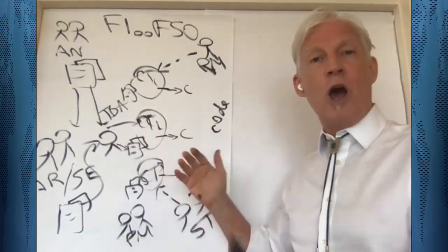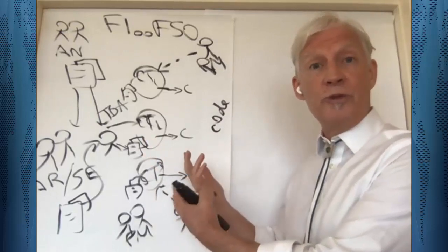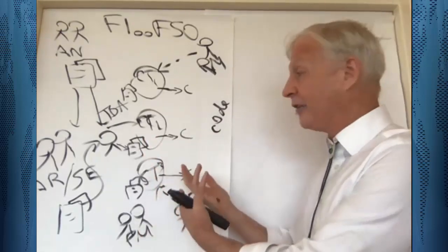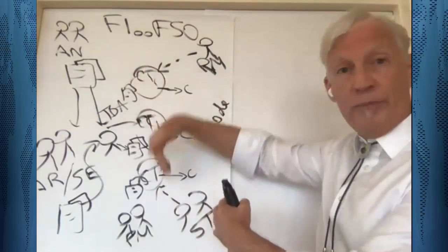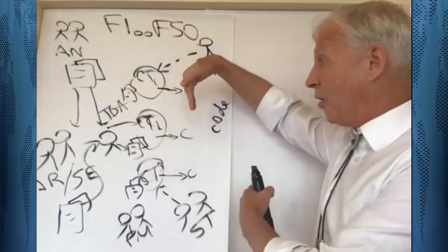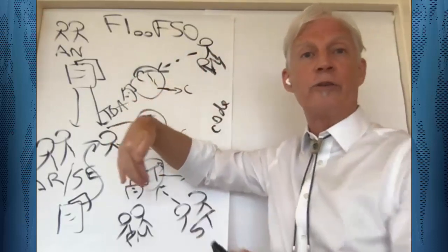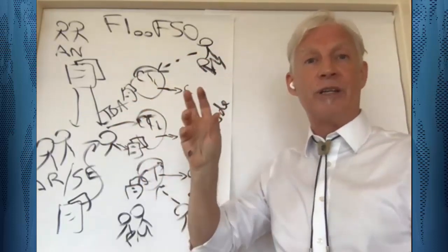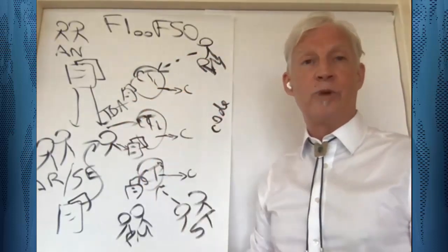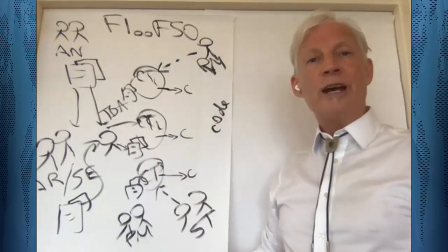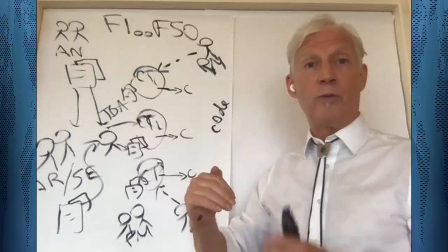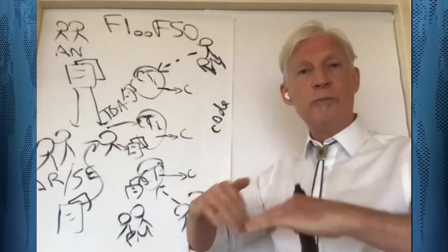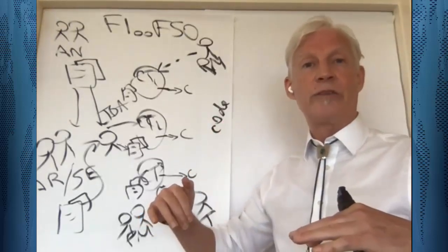Most of the problems are in the artificial wound of complexity, which has been added in this organizational design. The handoffs, the middlemen, the high work in progress, et cetera, is all a side effect of having this construct starting with component teams. And so the idea in LeSS is to move to a different, simpler model where we descale and remove much of the organizational complexity.